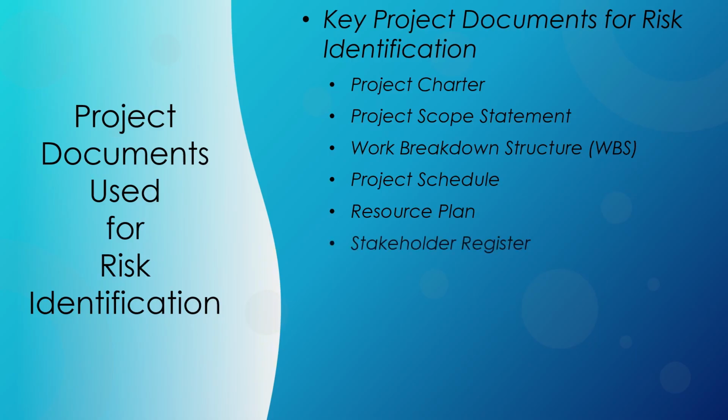The stakeholder register lists all project stakeholders, their roles, interests, and influence on the project. It provides insights into stakeholder expectations and concerns. By analyzing the stakeholder register, project managers can identify risks related to stakeholder engagement, conflicting interests, and stakeholder resistance.